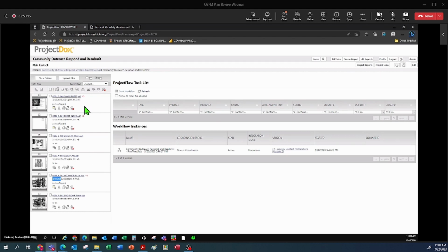The exception for that is if you're adding a sheet in the middle of the review to this. So if I added sheet 6 onto the end, then on my back check, it would not get a version indicator because it did not have a file preceding it. If you also inserted one in the middle and there's a decimal, so our intake staff will look through here and they will look for sheets that don't have a version indicator and try to evaluate if the file name changed, if it has a decimal and that's why it's being submitted now and it wasn't before.